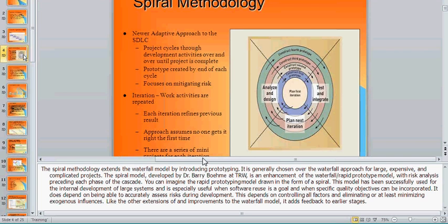The cost is also lower as compared to, remember in waterfall, if you went through 2/3 of the project or 3/4 of the project and then realize it's not going to meet your objectives, or it will only meet 50% of your objectives, you've used up the money and you have not even met your project goals, right?